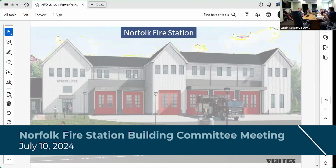But part of what he needs to input is getting the dates from Bright Light and Cam HVAC, who've given some, you know, these are our dates if we get these things energized. So I think the Friday meeting is going to generate answers. We asked for a recovery schedule, but we also asked for a mini schedule, just incorporating the HVAC and the electrical, because the commissioning agent is interested in it. Like I said, he needs to plug himself in to come out here and witness startups.